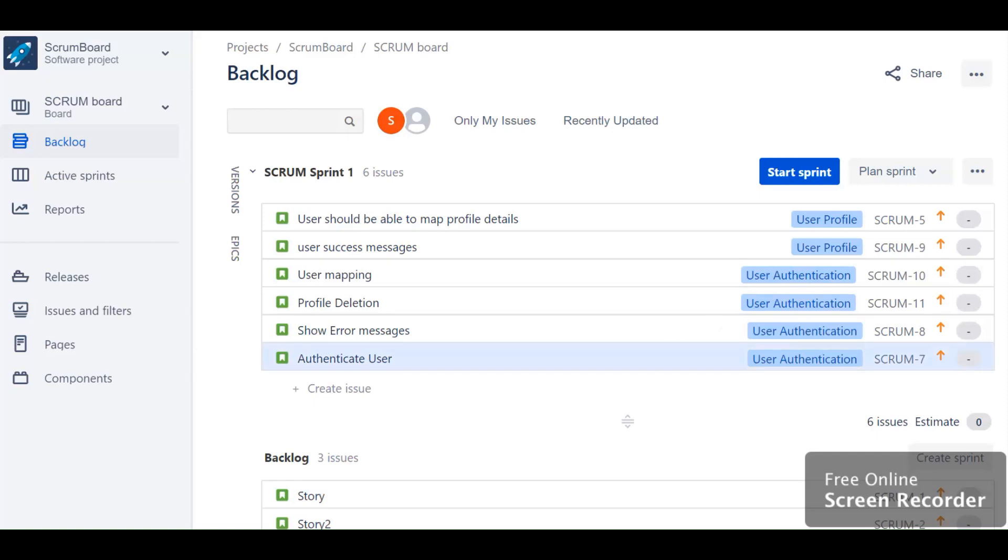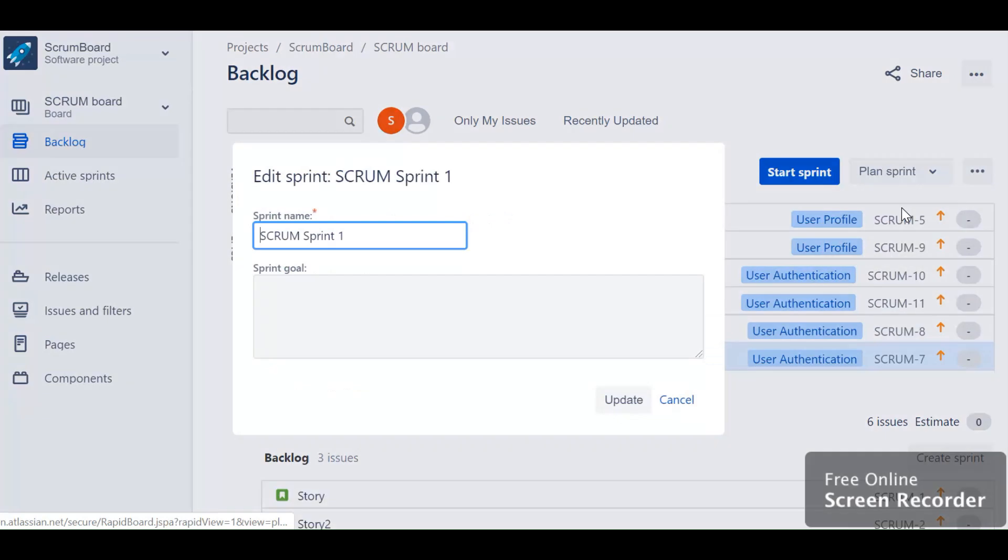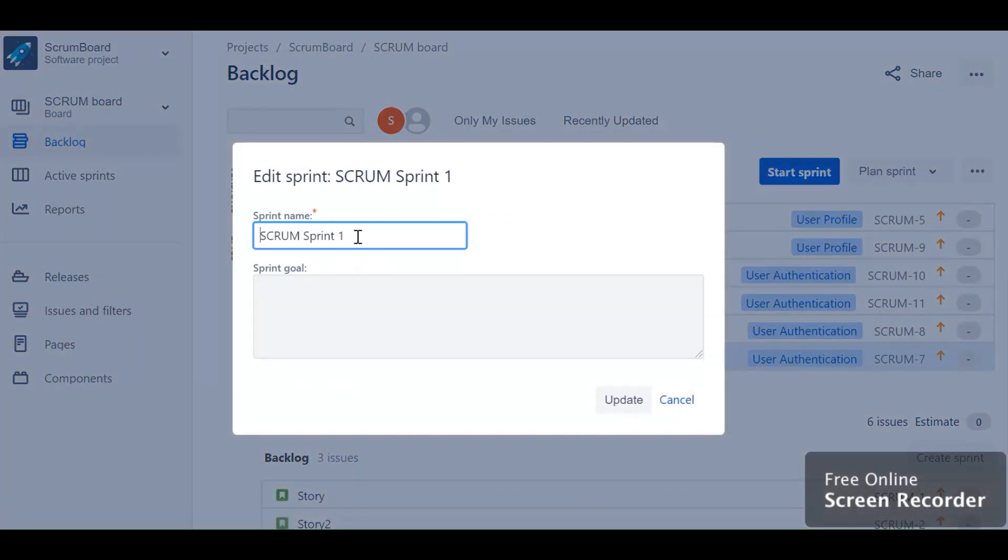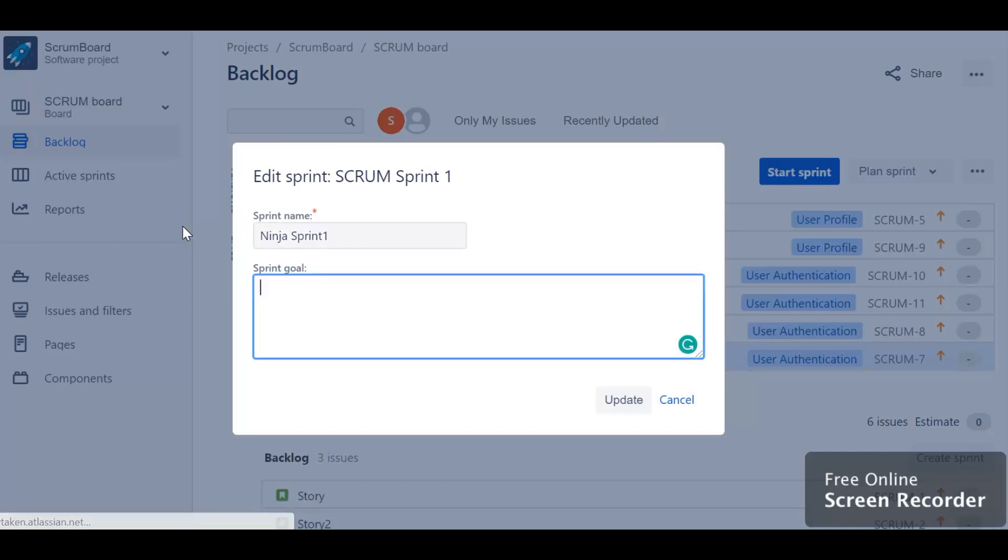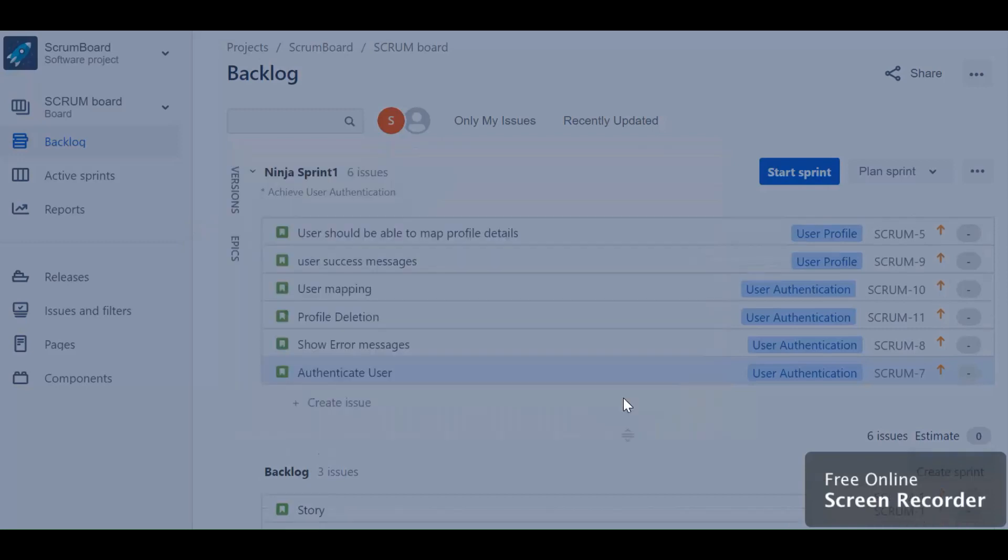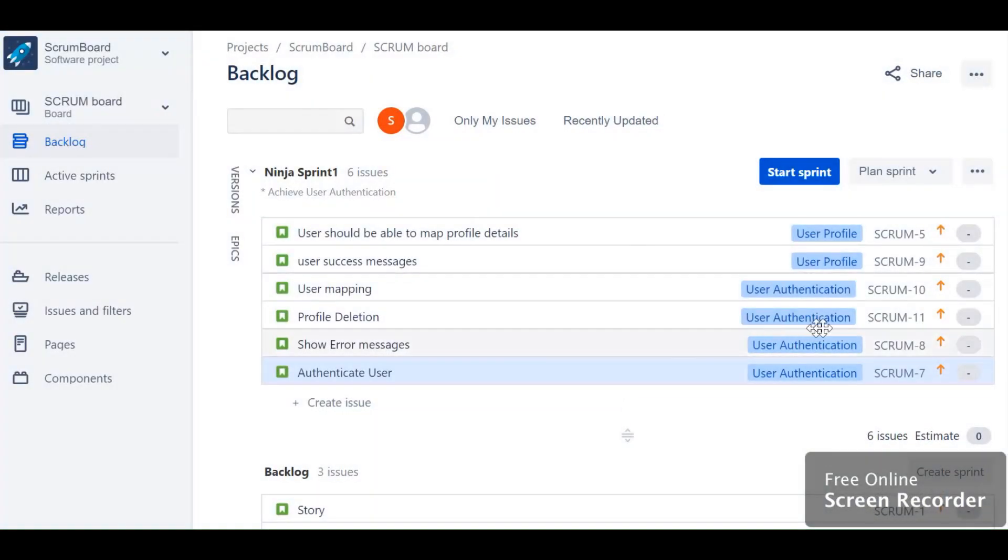You can even edit some properties of a sprint. In case you do not like the name, you can give a different name - I'm naming it Sprint One. Here you can add the sprint goals, for example, achieve user authentication. This is what I want to achieve in this sprint. I have updated it. Now you have a sprint goal which is appearing over here and your name has also changed. These are the set of stories which are ranked.